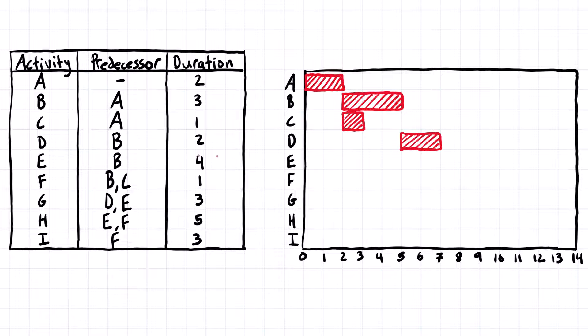Then activity E also can't start until activity B is finished, and this one is four days long. So again, we find where activity B finishes, we drop down to E, and we're going to put this one on for four days.